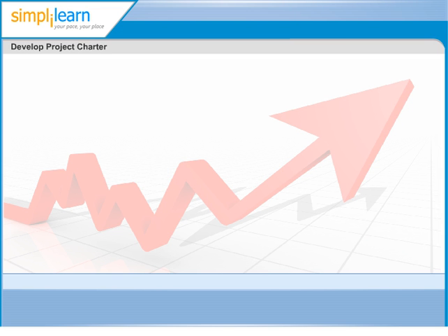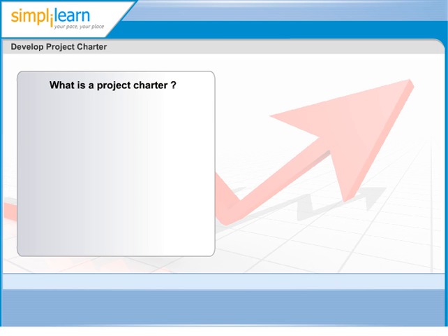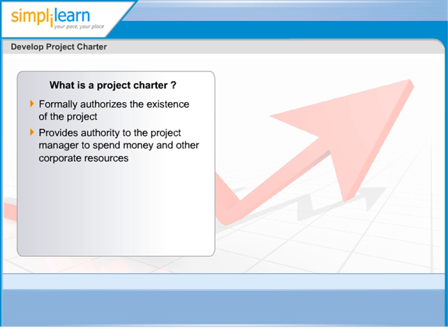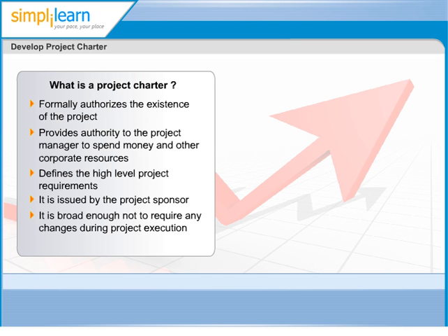Develop Project Charter. Let's look at the Develop Project Charter process in more detail. What does the Project Charter contain? Well, it varies a little bit from organization to organization, but at a minimum, a Project Charter should establish the existence of the project and also provide the authority to the project manager to commit money and other corporate resources to the project. The Project Charter also contains the high-level project requirement,